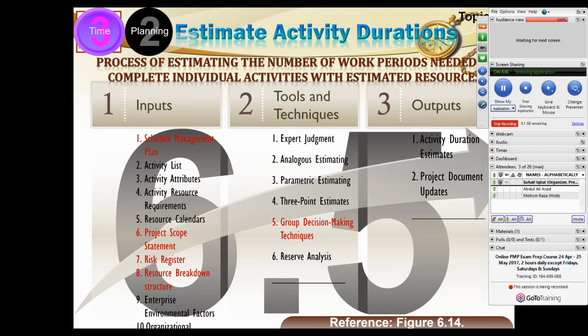You must keep reserve, yes, of course, but then you must have a justification. And the value of reserve cannot be static for all activities. In some activities, you will require 5% reserve, in some activities 10% reserve, and in some activities no reserve at all. And in some activities, you may even have to have 100 or 200% reserve. So this all depends upon the activity.